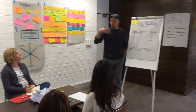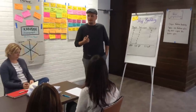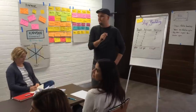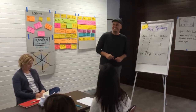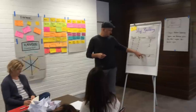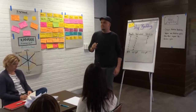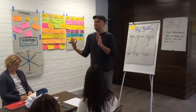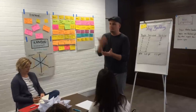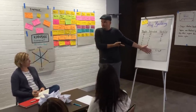Because we were able to process more ships, right? So what else could we do? We could help in the bottleneck. Why would we want to do that? Good question. If we help in the bottleneck, what is going on with this number? It's increasing again. The point is that there is slack in our systems, and we should use this slack to improve our system, to help in the bottleneck, and so on. There's no point in starting new work.